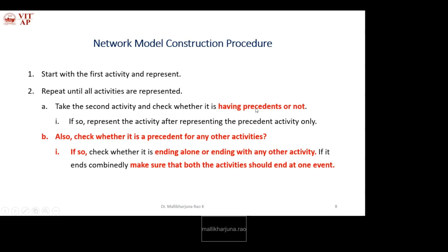If it has a precedent, represent the activity only after representing the precedent activity. That is, the second activity is represented only after its precedent is represented.